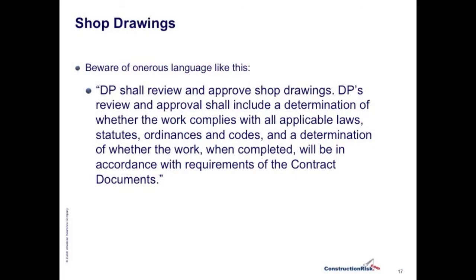Now, some contracts put the design professional in a bad position by using unfortunate language such as the following. Quote, "Design professional shall review and approve shop drawings. Design professional's review and approval shall include a determination of whether the work complies with all applicable laws, statutes, ordinances, and codes, and a determination of whether the work, when completed, will be in accordance with requirements of the contract documents." Close quote.